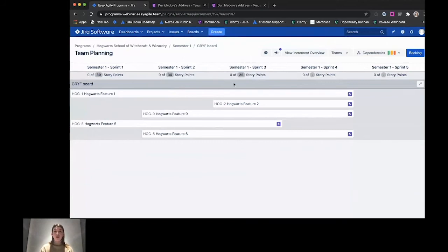The teams are also able to identify what features are we responsible for looking after in this program increment. So the features that we're seeing here alter from team to team. Every team will see the features that were placed into that shared team features swim lane, and then they'll also see only the features that were scheduled into their specific team swim lane.